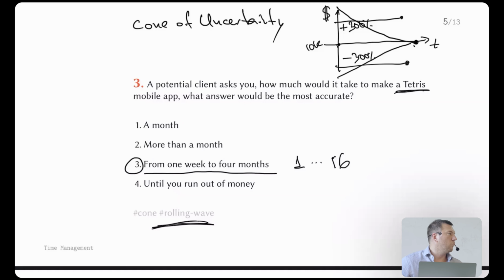So let's say if your project takes 1 year, then I would re-estimate the whole timeline every month. So we estimated when we started. We just put everybody together. We gave them the estimate spreadsheets. They filled out the numbers. I put everything together and informed everybody. We start coding, and then in one month I do the same. I check my scope. Something changed. I again ask them to re-estimate. They give me different numbers, and I compare. Okay, how do we move? We move lower. We increase the timeline. How much more we are behind or ahead, and then every month, you will see how your estimate goes closer and closer to reality.